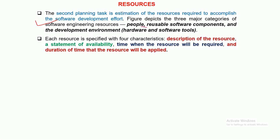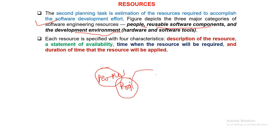The three resource categories are: people, reusable software components, and the development environment — hardware and software tools. A project is basically dependent on these three kinds of resources.